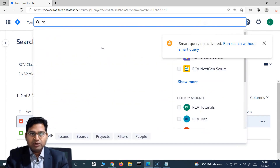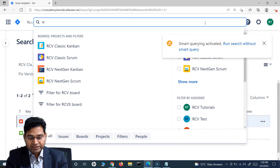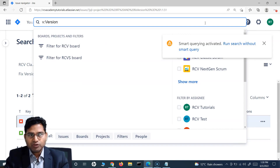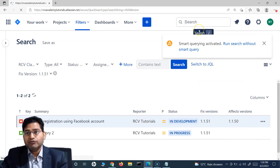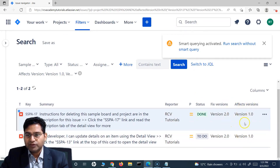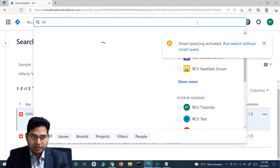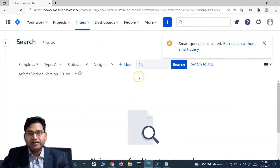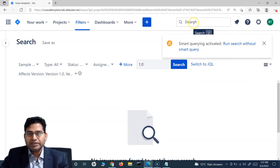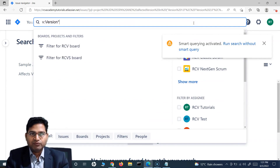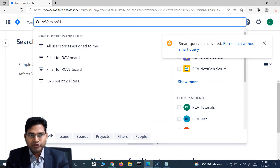You can also use wildcards. If there are spaces within the version name — for example, you are looking for 'version 1.0' — typing 'v:version 1.0' and entering doesn't filter any issues, because of the space. To handle this, use a wildcard in place of the space: type 'v:version*1.0' so that anything between 'version' and '1.0' is matched.